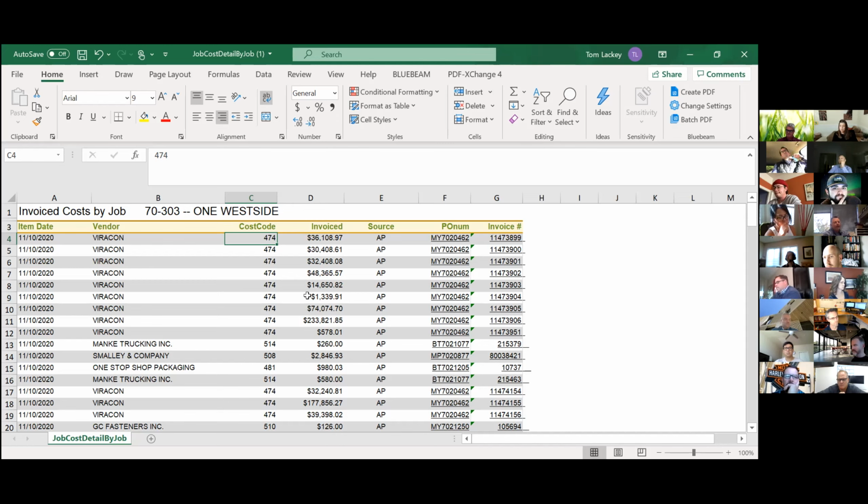Probably not. We'll work on that, but the problem is right now there are some customers that don't ask for invoices. And quite frankly, we're gouging them. We have these really good customers that treat us really well and trust us, and we take stored materials and mark them up 100% and bill for it because they don't ask for invoices. Other customers we bill, and they come back, and we provide invoices, but then they go, hey, you have a 30% markup on these. And so we think 20 is fair.